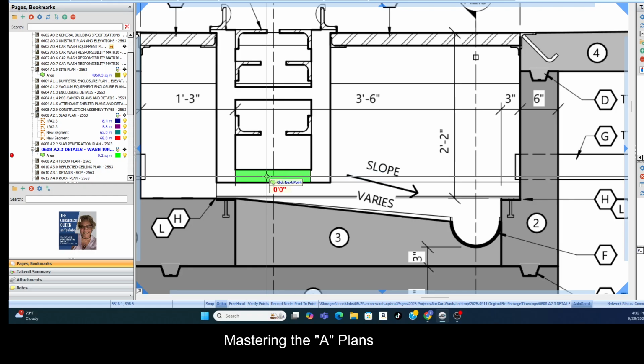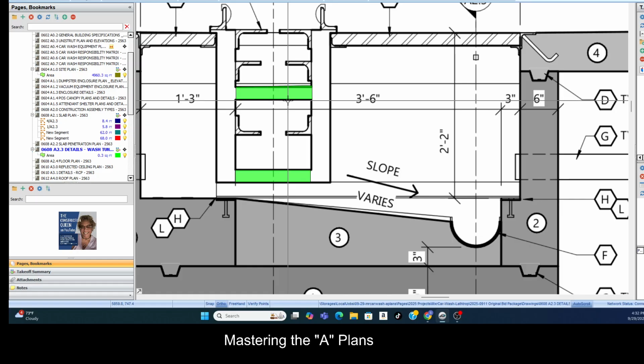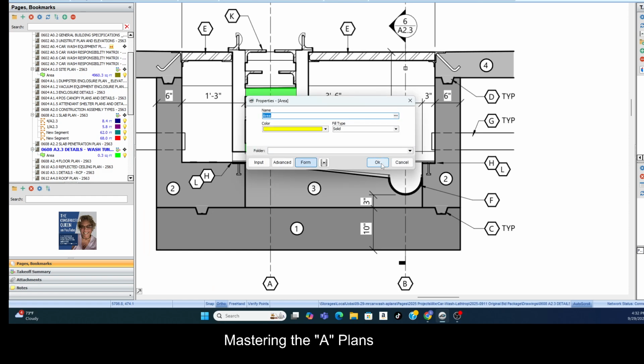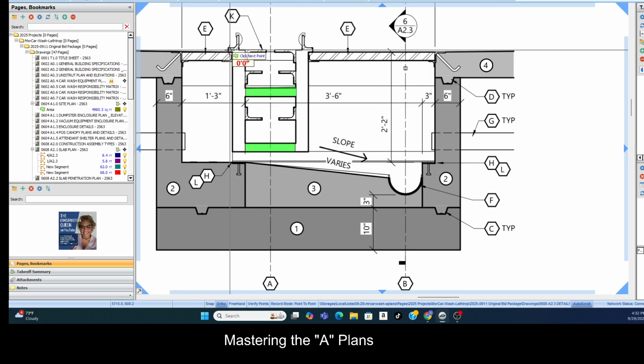So 62 feet times 0.2 square feet, but we have 2 of these, so 0.4 if you really want to be specific. All right, so that's 0.3 times 62 feet. And then we have 62 feet times this area, and that'll give us another cubic foot total, because we measured that length from that section view of 62 feet.